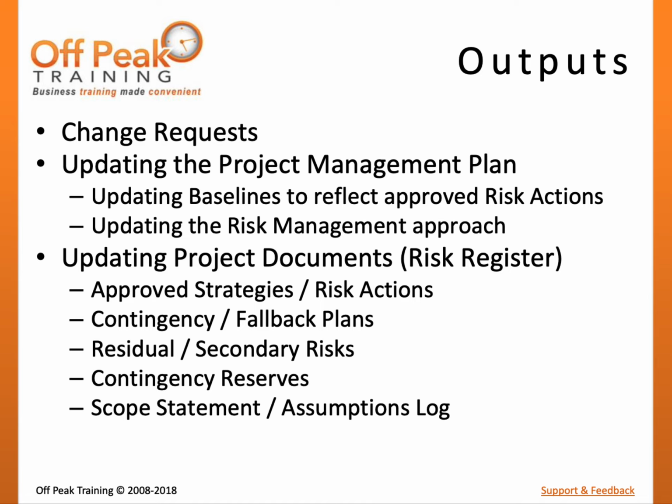Since some strategies may include multiple actions, the term risk action owner can be used to assign responsibility of executing a single response. Trigger conditions can include possible events, symptoms, or other warning signs to monitor and control risk and indicate a timed implementation of response.